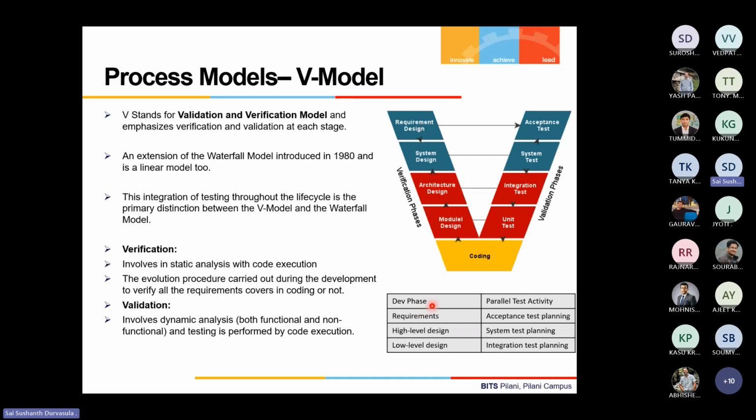So what we mean by this is having parallel testing or validation done for each of the phases we have, right? This table showcases, for example, that in the development cycle, when product managers are working on the requirements, the testers can parallelly work on the acceptance criteria and do the test case planning, right?